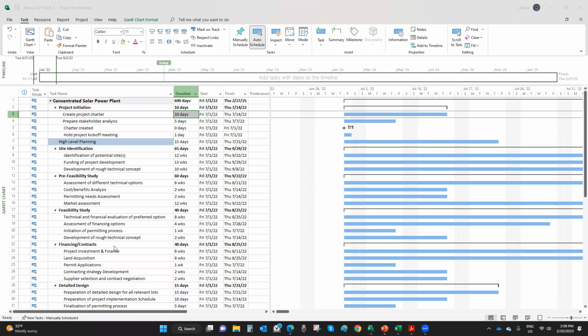Go ahead if you're ready. In looking at the feasibility study section, it's showing 40 days to do the feasibility study. It looks like it's taking the longest item in that section. So 8 weeks, assuming 5 days a week, that's 40 days. So it looks like it doesn't total all of them. It just finds the longest. Yes, the task with the longest duration. Since we haven't put in precedence yet, that's why it's doing that.